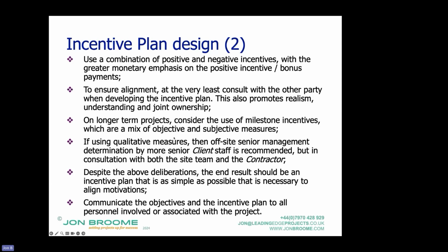Going down to here, longer term projects, consider the use of milestone incentives. So projects during the contract. And the reason for that is that we are like children. We want to be rewarded close to the time that we do good performance. So that could be meeting time milestones. Well done, you've met it. But it could be also subjective ones, which are more around degree of cooperation, following procedures which you believe will give good results, etc., and so on.